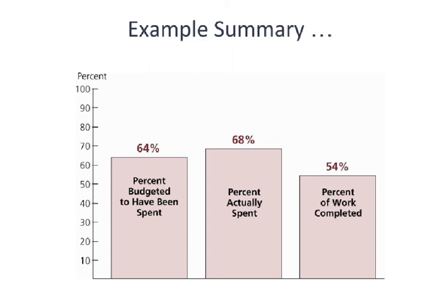And so as you start tracking these things on your projects, be aware that these two items together show you the picture as to how the project is really progressing. Individually, they are indicators, but they are not enough. It's really dangerous to just look at the CAC or to just look at the CEV. You need to look at both in order to see if things are moving in opposite directions or trends are occurring.